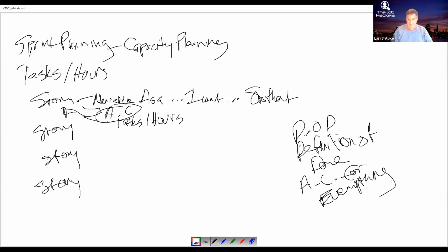What are some examples of definition of done? Well, there's going to be environment. The ultimate definition of done is I've finished the work in 2 weeks, or even in 3 days, sometime during the sprint, and I've actually delivered it to my customer by the end of the sprint. Then it's done. Most places, how many places can do that? Not most places, especially if you're coming out of waterfall, especially your new team. You're going to have some idea of what environment is. I'm going to talk particularly about software development because it's what I know. You're going to have different things for whatever you do if it's not software development.